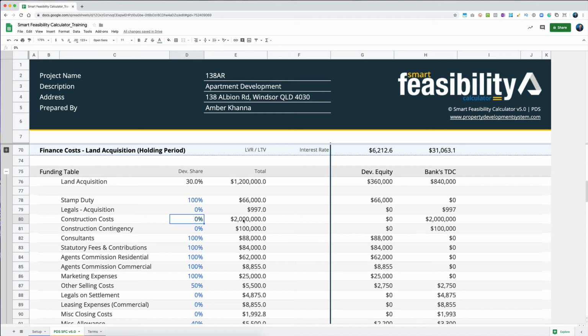So if you have a lower contract, let's say 1.5 million with a builder already in place, the bank will consider that, so long as the quantity surveyor that the bank hires to calculate all the cost of construction comes within a 5% range of your total number.